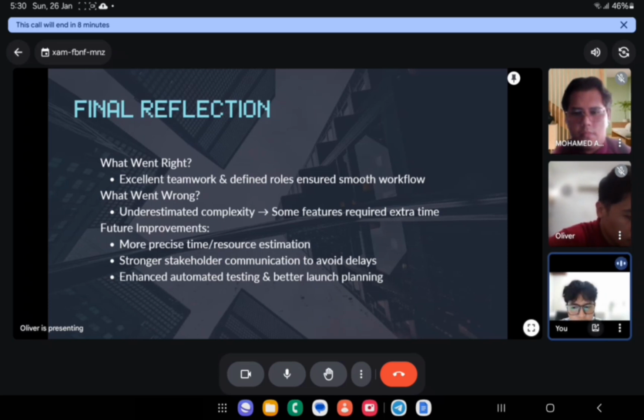The second risk is customer feedback and reputation. The second risk involves negative customer feedback, which can harm the app reputation. Poor reviews often stem from inadequate customer support, leading to user dissatisfaction. Triggers like negative reviews and complaints emphasize the importance of user satisfaction. To mitigate this, we aim to enhance our customer service and focus on feature updates that address user needs.